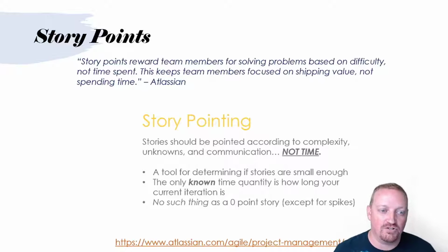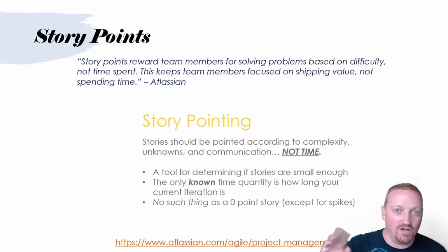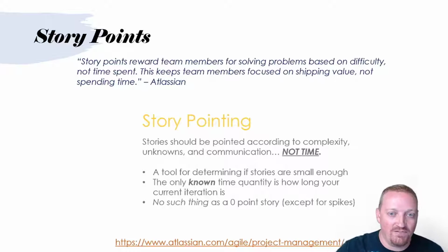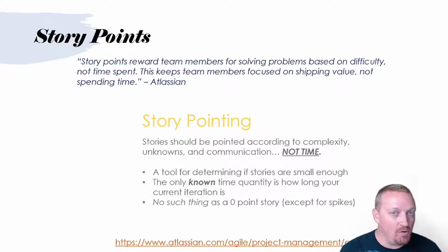There are other factors involved here, like the unknowns, the things that need to be explored and understood. And then there's the communication aspect if you have to talk to somebody outside of your direct team, right? You have to talk to another team in the organization, another customer, or maybe it's an API that you're communicating with and you've got to go talk to the creators of that API, right? If there's some sort of external communication involved there, that adds to the level of difficulty, and that is a different dimension of difficulty.